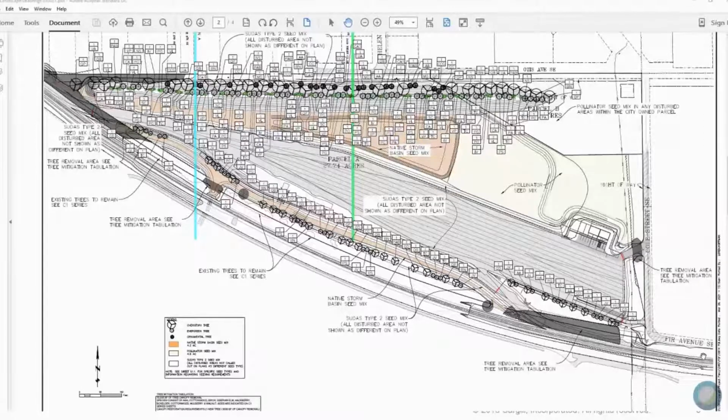Eric, do you know the answers to those questions? Yeah, I was going to say that's just within the control of the city. Our development agreement states that we will reimburse them for up to $400,000 in costs of converting that to a quiet zone. Their initial estimates are in the $250,000 to $300,000 range. So we were confident that we were having enough reimbursement that they would be able to achieve it within the cost of what we'll reimburse. As for an update on that, I do not have an update. We are not involved with the exception of reimbursing the costs.